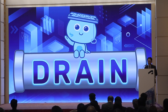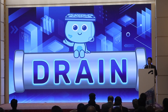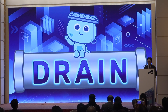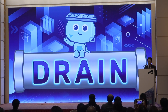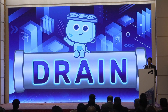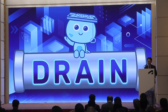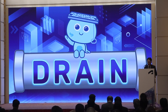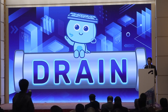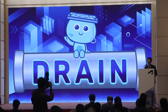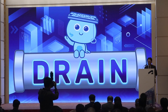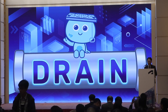A stands for arrangement — the logistic arrangement. We use BIM to create the 4D program and construction sequence, which helps us build a good understanding of work progress and the method statement for works construction. I stands for Industrial Foundation Class, IFC. IFC is a file format used in the architecture, engineering and construction industry to facilitate interoperability between various software applications. It is an open standard for exchanging information about building and construction data.